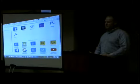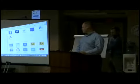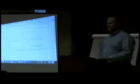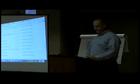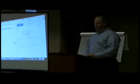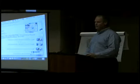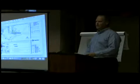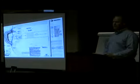So you will see on plan sheet 301A that's in your packets, there is a 30-inch bypass culvert that we have now added to the plans. The purpose of this bypass culvert, which goes right next to the now filled existing stream channel, is that we can put flows and bypass flows around our construction area, separate the water from construction, not only during the construction of the safety area and the relocated stream, but also to allow that whole area to grow up, let the seed take for a couple growing seasons, let it establish before we actually introduce the flow back to this system. It's a significant event, putting it in, significant expense, but it provides a lot of constructability improvements for this project, adding that 30-inch culvert, which will be abandoned in place once it's all done.